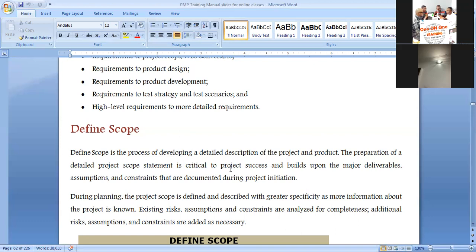There are bases, and then you have to consider past trends to project material cost, material availability, and certain things to come up with your budget. You still have to plan, but you will plan with history. Just like the Nigerian economy is volatile and things are going up and up, it still has a trend.